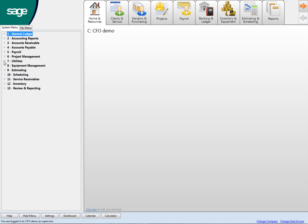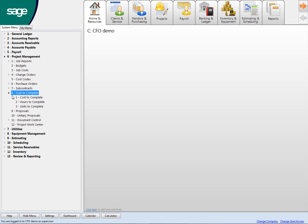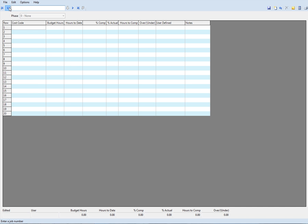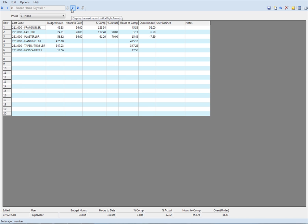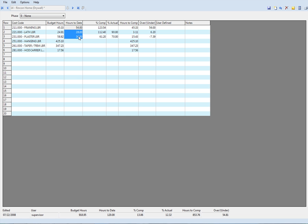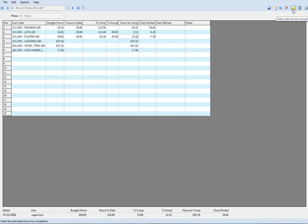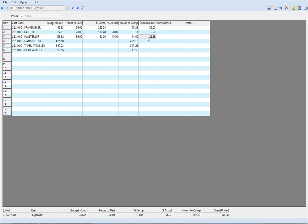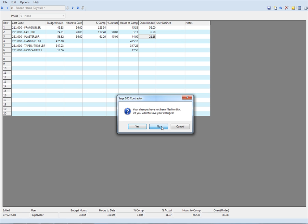In here, I have an hours report. These are just - it happens to be a labor framing company, but it would be your cost codes or items here, the hours that were budgeted in your estimate, the hours that have been processed through payroll so far. Then once a week, you're going to come in here and update this column. Like on this item, I'm actually - let's make this a bad job. I'm only 45% complete. So I had 52 budgeted, I've spent 36, I'm only 45% complete. So now it tells me I need 45 hours to finish it, and I'm going to be 21 hours over budget. So that's the hours report, the one you asked to see.